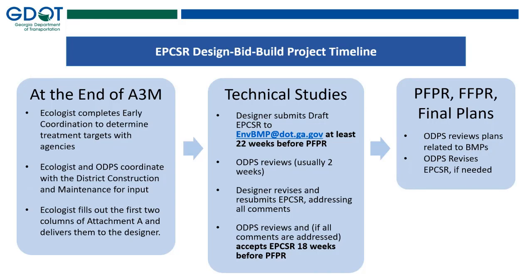In this report, the attachment A table can be filled out during the A3M meeting, possibly. So for folks looking for efficiency, consider bringing that to your A3M meeting and going through that directly. Once Ecology sends the attachment A table to design, Ecology should expect the completed EPCSR 18 weeks prior to PFPR, which is in time to incorporate the results into the Ecology AOE.